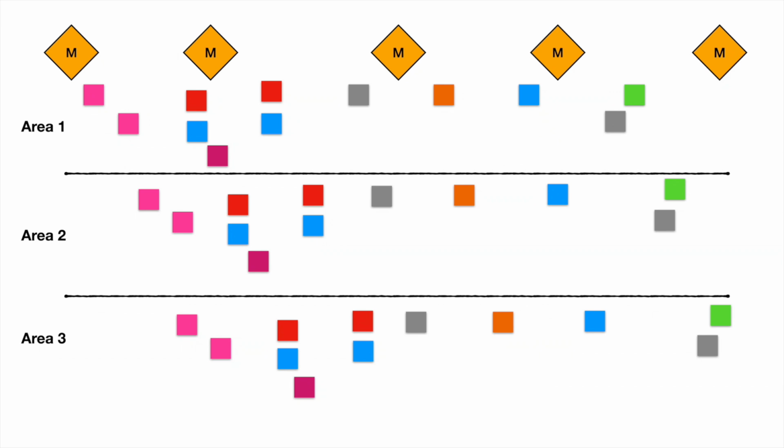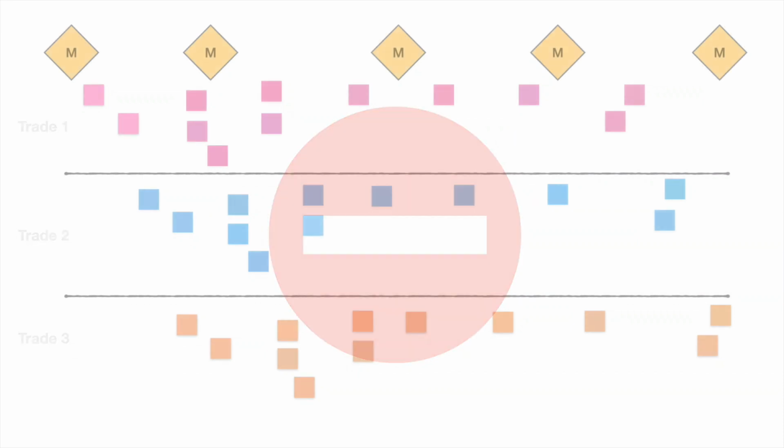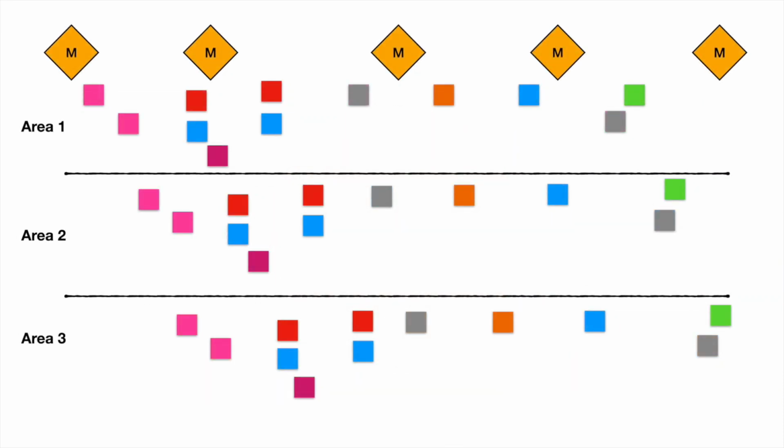This is your opportunity to gut check your assumptions in the schedule and test any what ifs with the path of construction or with handoffs. Some project teams want to use swim lanes for each company, but this should be avoided. Each color already tells you who's doing what, and the team misses out on showing handoffs of work from one company to the next. And lastly, some final considerations for a pull plan to make it more readable.